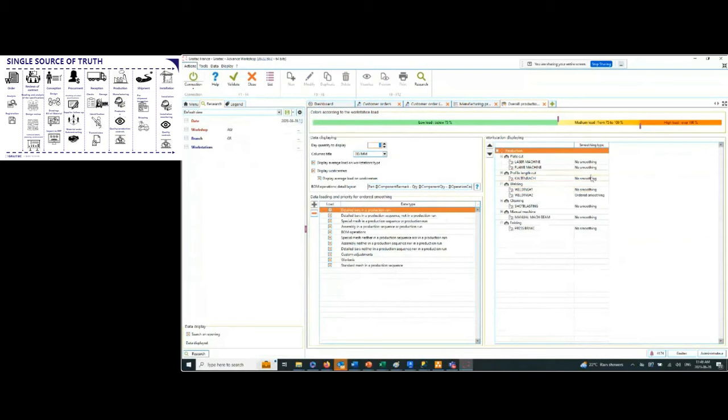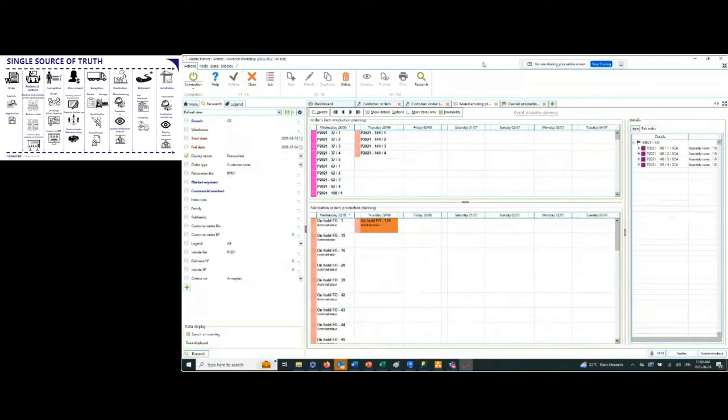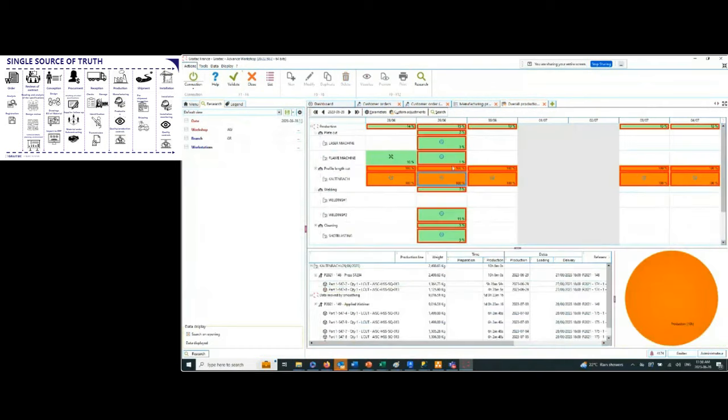Now I've seen that I can indeed execute everything on Thursday, but just for the callback, it's going to take a little bit more time to process everything, and those operations will be complete on Tuesday of next week. This could be due to not only this one order. Keep in mind that there are other orders I executed last week, so it could still be processing orders from another project. As you see here, 148 is from another project, and those times are still pending on that machine.